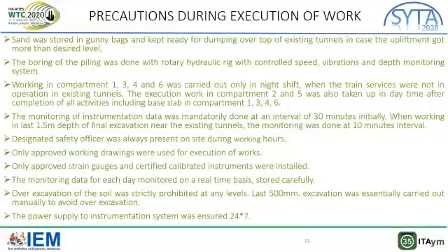The execution of work in compartment 2 and 5 was also taken up in daytime after completion of all activities including base level in compartment 1, 3, 4 and 6. Other safety precautions were like designated safety officer were always present, approved drawings were used, approved strain gauges were used, data should be monitored on a real-time basis, over excavation of soil was strictly prohibited, the power supply to instrumentation system was ensured.